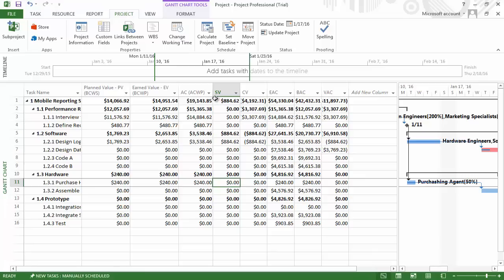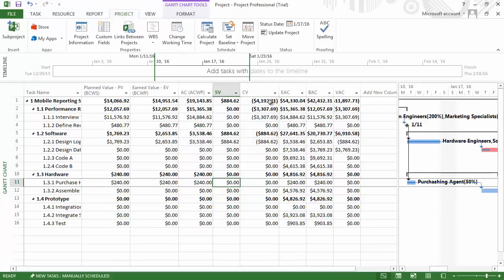We have a positive schedule variance which indicates that almost $900 worth of work has been completed up to this point that wasn't planned on being completed at this time, but we have a negative cost variance. This indicates that based on the work actually completed, we are over budget by approximately $4,200.